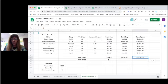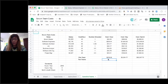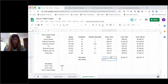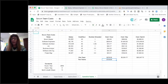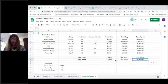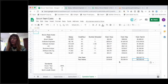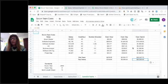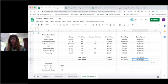For two, let's just do that, that's what our estimate was. If we've got typically two scrum teams that we tend to see in many organizations, all working to deliver one product or a set of features. Now you start to see the cost that you've got both per sprint for two scrum teams at almost $61,000 per sprint of two scrum teams delivering your features and product.